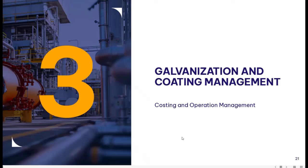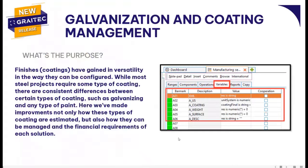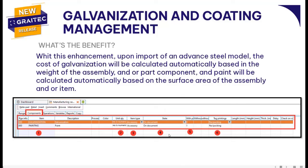Moving on to what's new for 2025: we'll take a look at galvanization and coating management enhancements. In this latest release, we are able to factor in the costs for coating and galvanization automatically upon import. Based on the surface area of the assemblies, we can calculate the cost for paint, and based on the weight of assemblies, we can calculate the cost of galvanization. You would pre-define these costs within the item codes themselves, and upon import for quotes and customer orders, we're able to calculate this — compiling the information automatically without requiring any manual calculations for your quotes.